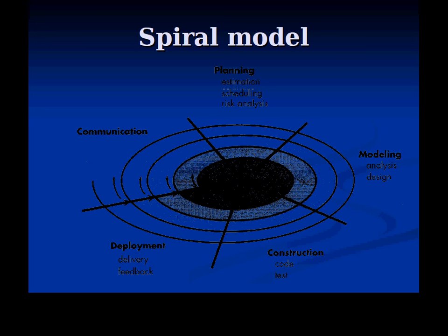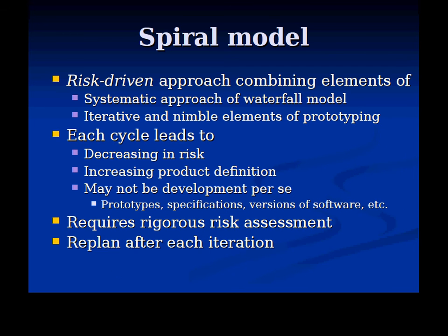You did. Okay. So with spiral, basically you're going through multiple phases where you're doing analysis of what's needed. You are doing further planning on what needs to be put in place, how long it's going to take. You figure out what can we afford to do in these 3 weeks. Communicate. You actually do construction, development of it, and you iterate further. And there's many iterations of this.